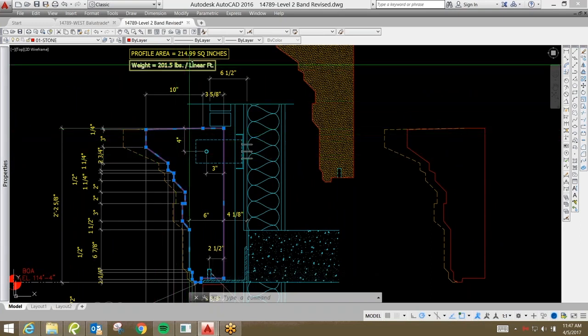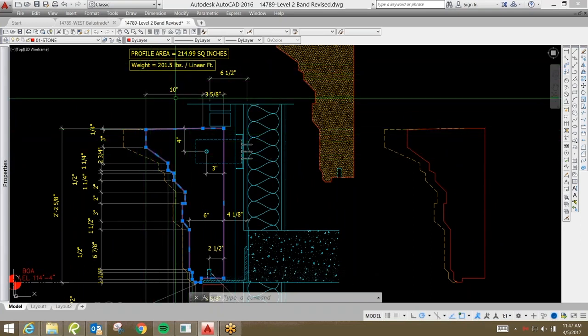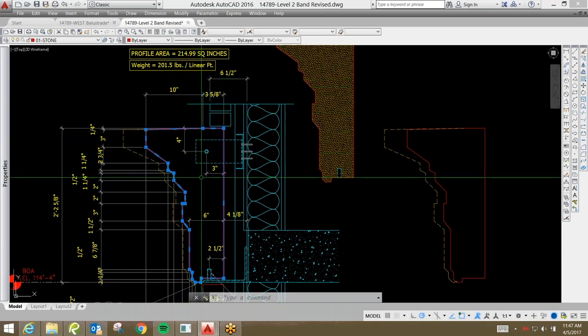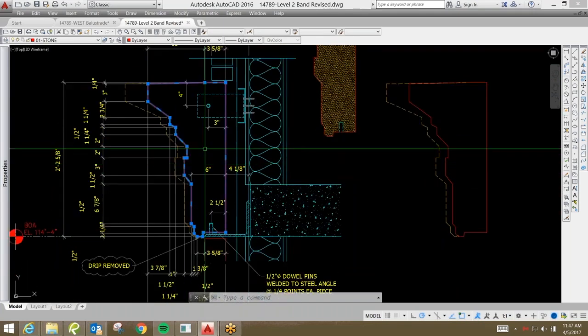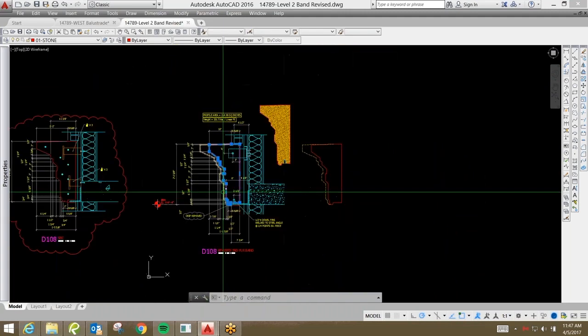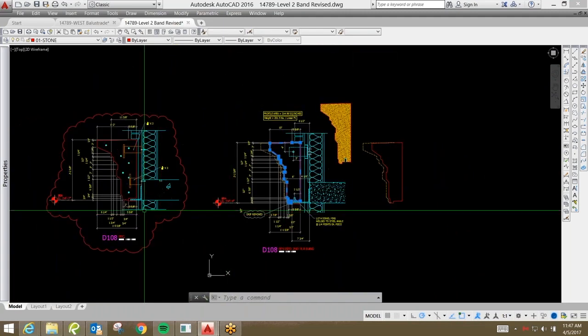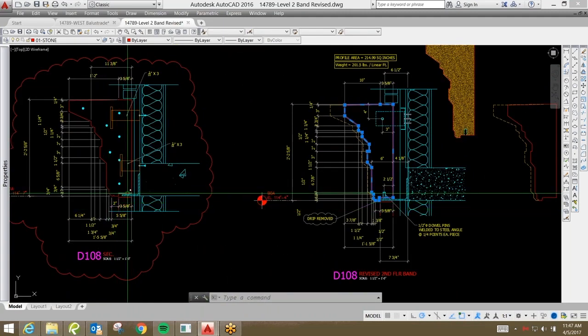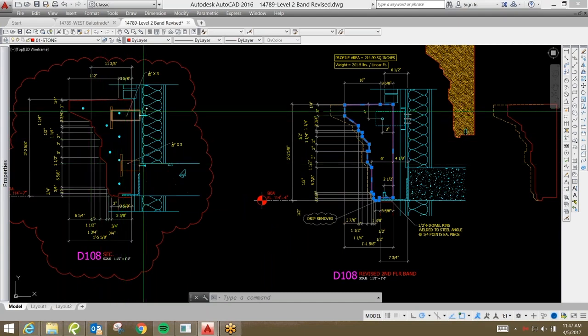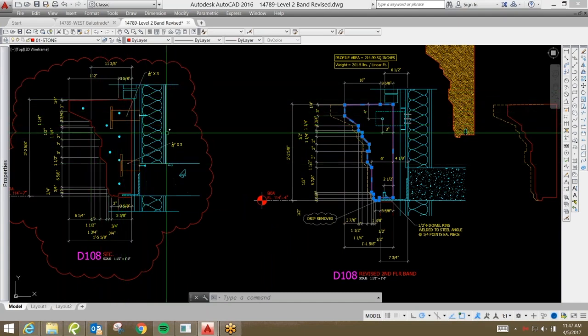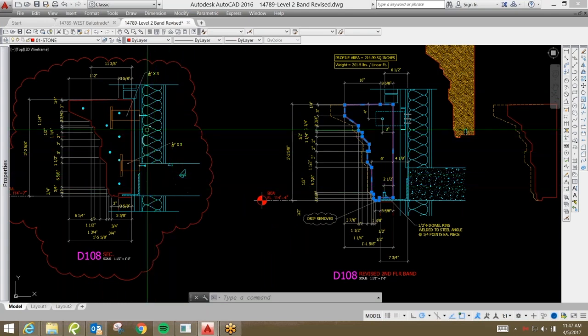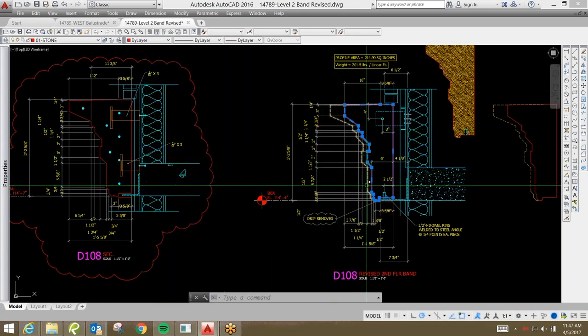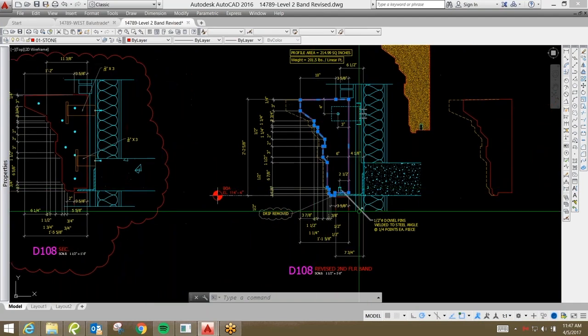And as you can see that these pieces weigh about 200 pounds per linear foot. So, that is just an example of how the profiles need to be designed along with the structure to make sure that this can be adequately attached to the building.